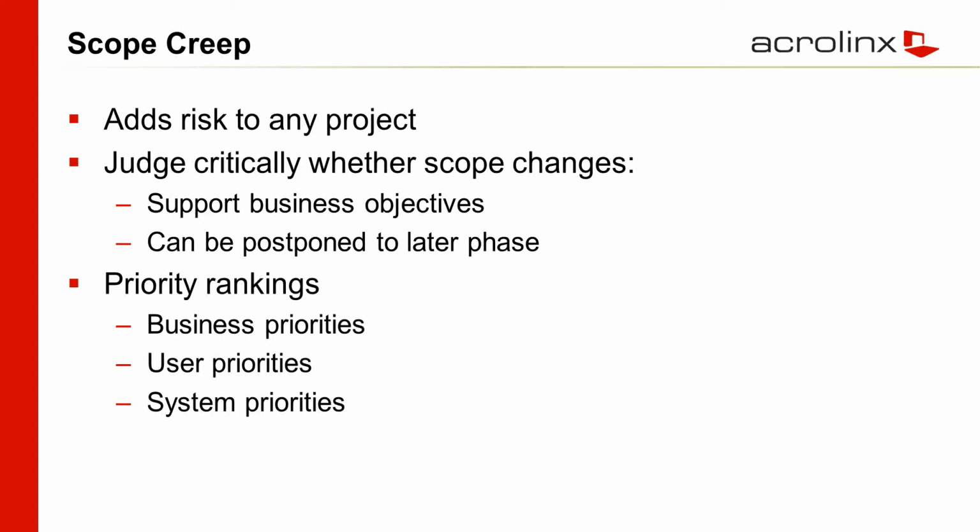Now, the last part of the slide here, I was at a conference last week, and one of my favorite presenters, who's been doing XML-based authoring and publishing implementations for a very long time, a guy named Joe Gollner, in his presentation, he said that they rank the importance of requirements in descending order, starting with business priorities. What does the business need? What do you need to accomplish the business result? Second, user priorities, what you need to keep people happy. And third and last, system priorities.